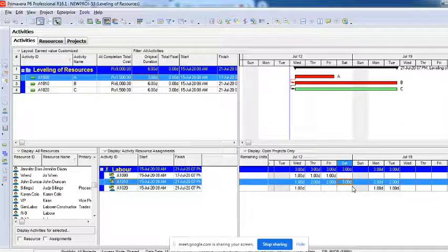Earlier we had asked for 4 labors per day, but as we do not have them, I am distributing 3 resources per day, as that is what we have committed, or what the resource has been committed to us. So we have 3 labors per day. This is how I am distributing it. This is what you can call resource crunching, or you can decrease.